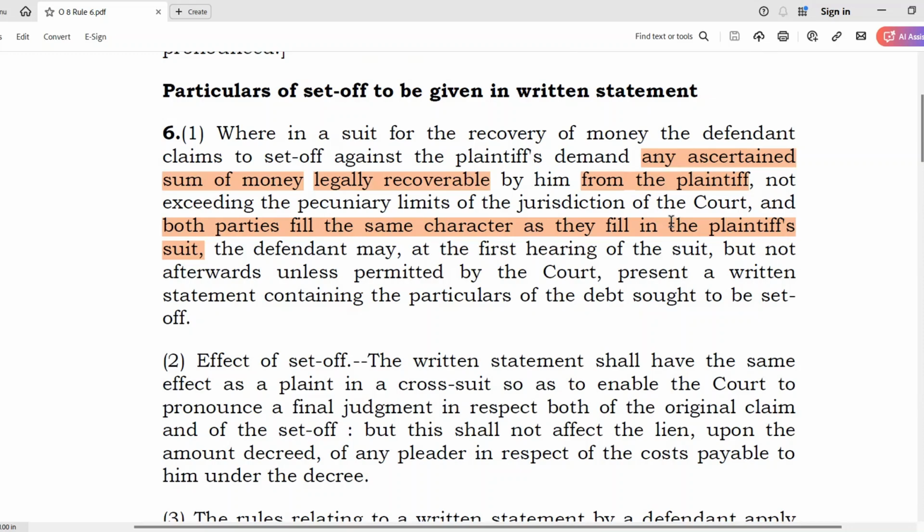And it would not be as advisable to have two independent legal proceedings or two arbitration proceedings, because ultimately there may be, and generally there is, a lot of overlap between the two contesting claims. Therefore, to avoid multiplicity of litigations and to have a comprehensive resolution of the dispute, it is advisable to deal with both the main claim and the set-off together.